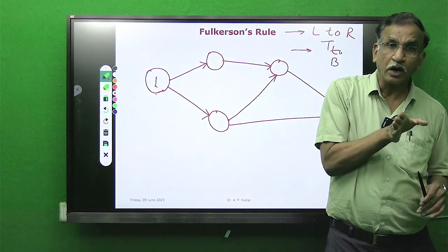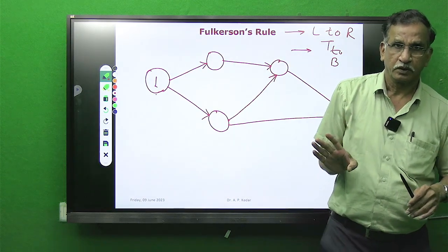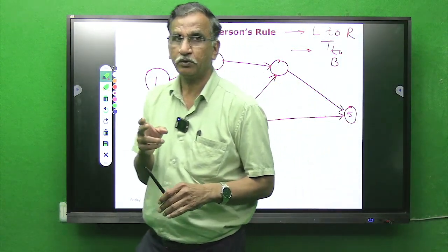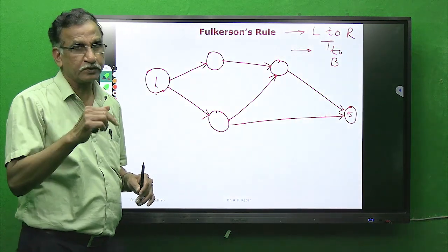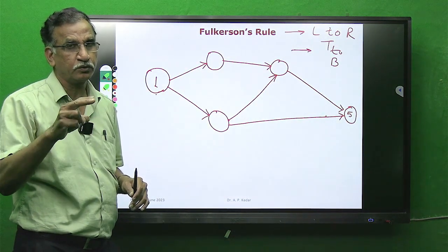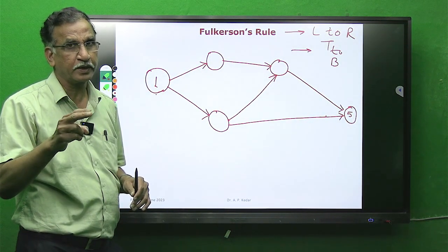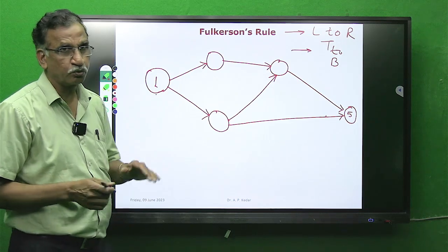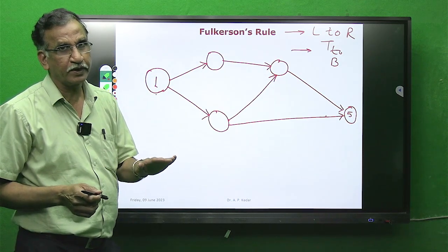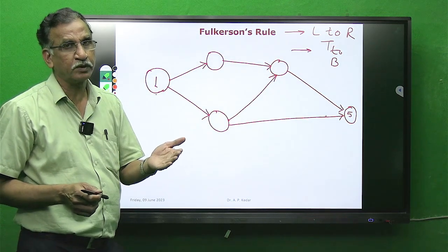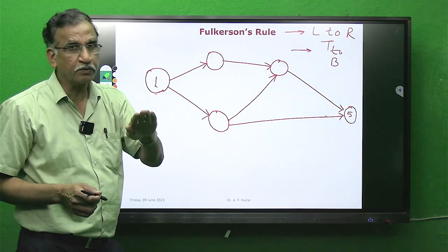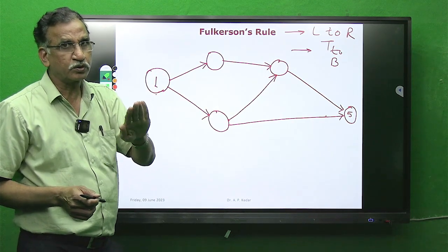It should have only outgoing arrows. If it has outgoing arrows, give that node or event the next number.